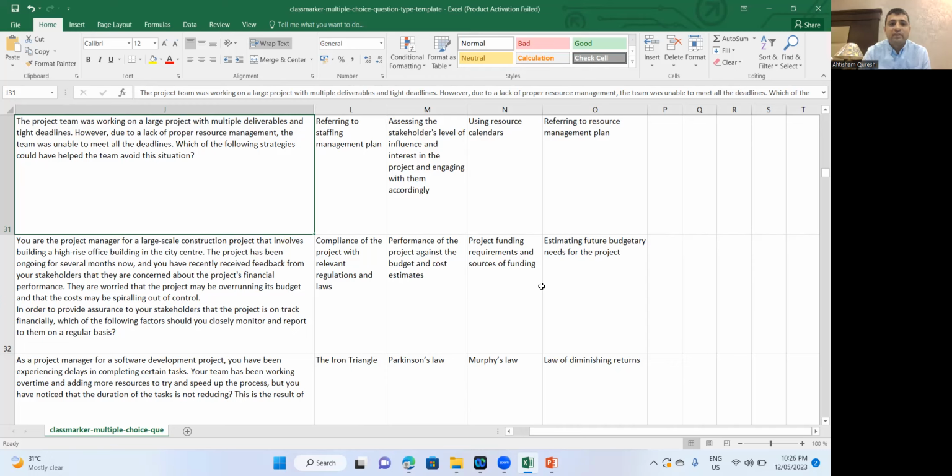Your actual problem is that deadlines are getting missed. So what is directly associated with this problem? Resource availability. And resource availability is found where? On your resource calendar.